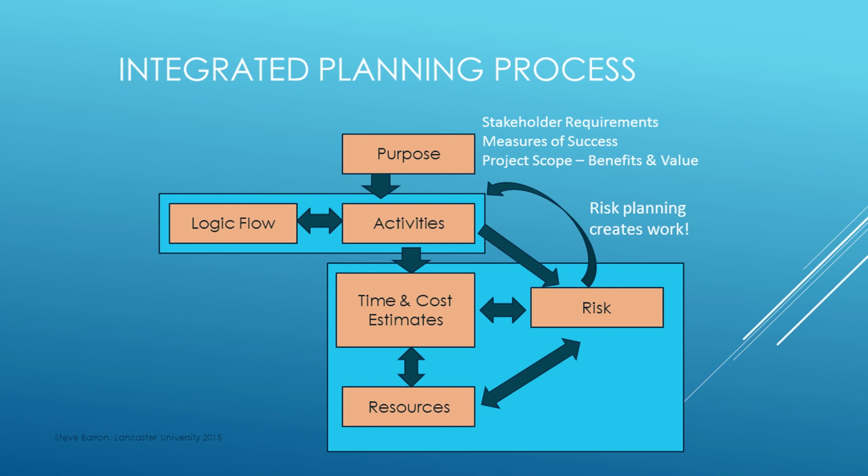As responses to risks are developed, we will introduce mitigation actions that need to be included in the activity list or work breakdown structure. These new activities will need to be further considered for their effect on risk, and we will have to repeat the first stage of activity planning. These two stages represent a considerable amount of development for the project and provide the majority of the content for the activity plan. Once we're comfortable with the plan so far, we can continue to the next stage.